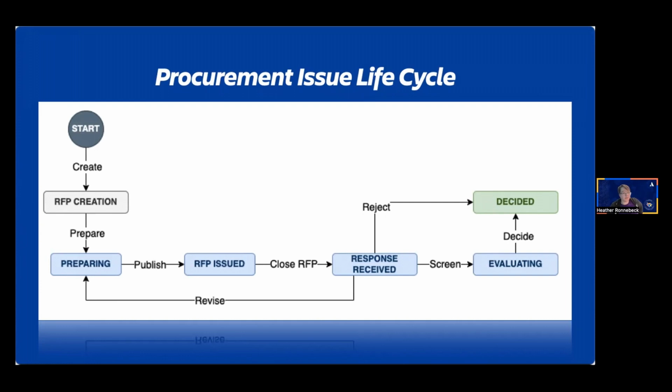And when they get into the evaluating status there, the procurement team is going to have to actually make some decisions and do their own deep dive on them. So they'll either label them themselves as declined or selected. And then let's not forget that they will transition one of these, the winners, over to decided as well. When the final subtask here closes, then the other automation here will kick in and the original ticket will transition to its decided status as well.